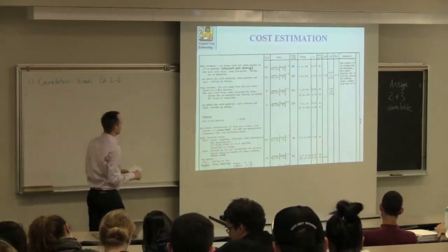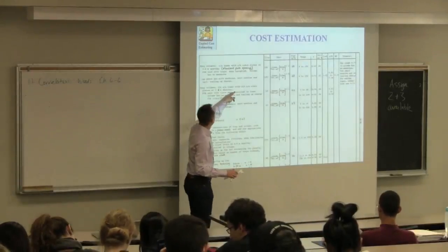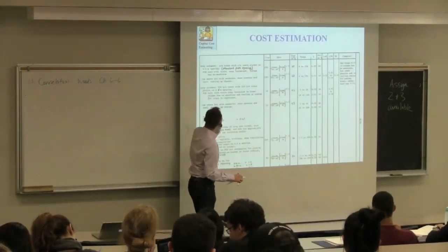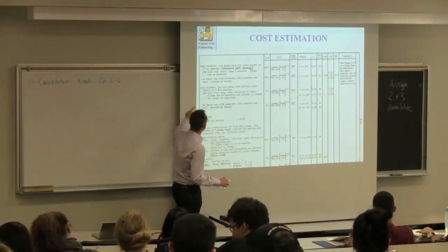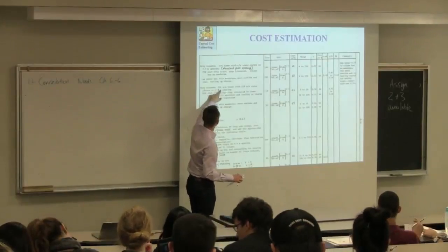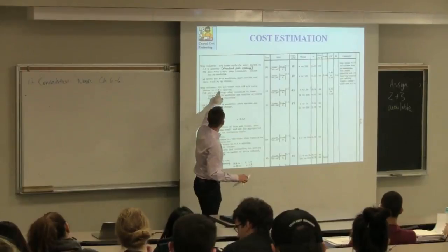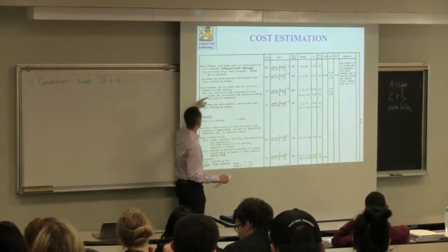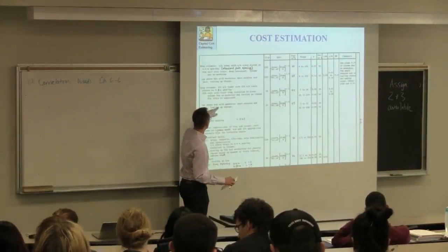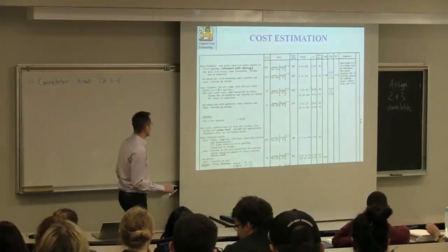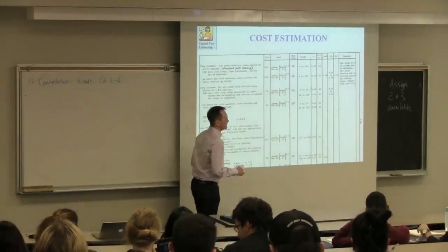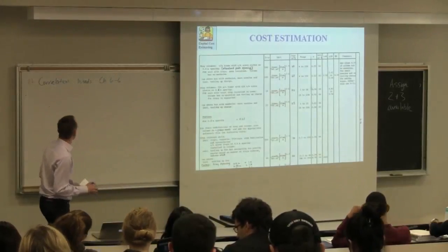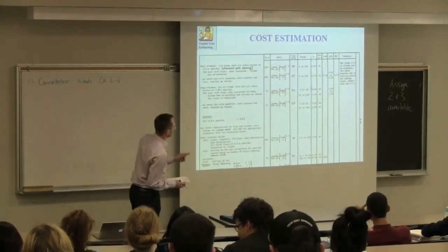And there's a correlation here for columns made from stainless steel plates on a 0.6 meter spacing. Just the previous row in this table was for carbon steel. This row over here is for 316 stainless steel, and standard spacing 0.6 meters. It includes the trays installed in the tower. The column has no manholes and tooling. And then this row over here is the same column, but with the manholes, nozzles, and tooling. So you'll go for the one with all the manholes for entry and exit into the column so that we can clean it out periodically. And then the correlation is page 6-6.